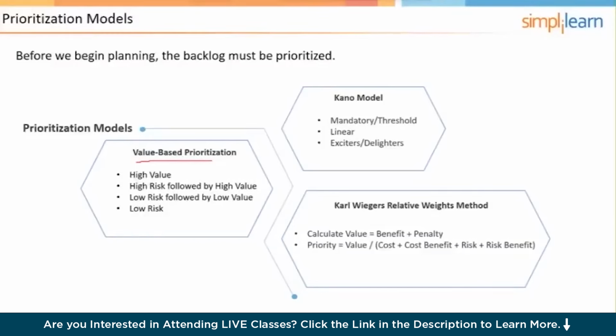The absence of them will never result in satisfaction going below neutral. But by adding them, you could create excitement and delight for the customer. These would typically be features that would be included in a premium version of the product, or maybe add-ons that are promoted at the point of sale. Have you thought about this because it'll really help you, or whatever. So that's the Kano model.